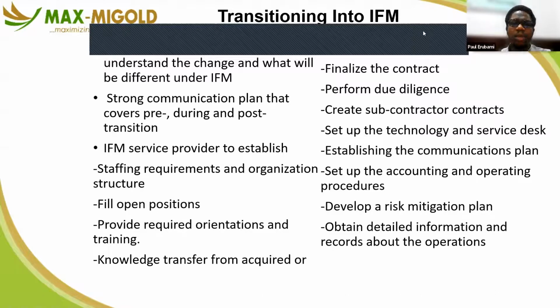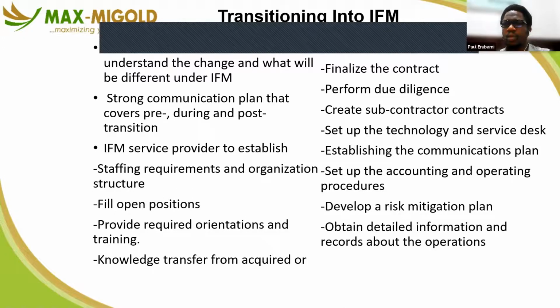And then you also don't just wake up and say the new contractor is on ground, they're taking over. No, there must be a transition process. Communication, carefully planned to engage your internal users, and also engage those who are leaving, to ensure that the incumbent does not go away with information that will be needed by the one being onboarded. A change management plan is put in place.